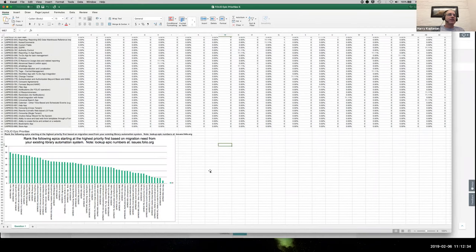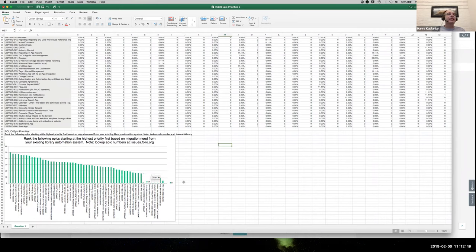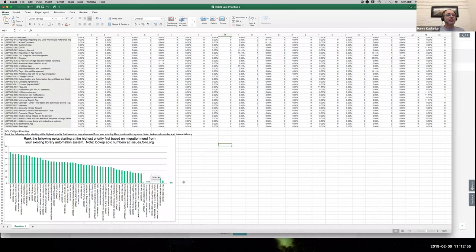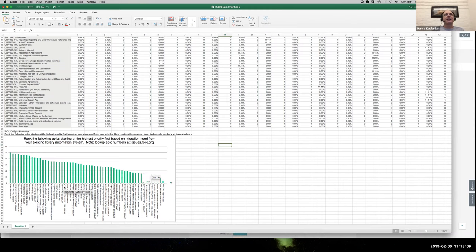But in the spreadsheet, we can sort them. And so, this gives you an idea, really a visual view of what that looks like. And so, within Folio, as new teams start or new teams form, as new resources are made available to the community, or as certain epics and features are completed, this helps us provide that big picture of what comes next. What are the next things that we've got to be able to build. And so, for the most part, there are few exceptions really due to technical issues or technical difficulties or dependencies. But in general, we go through the list essentially in priority order to knock as many of these out as possible.